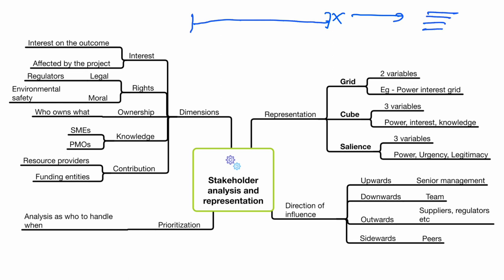Think of it this way: if a highway is being built or closed, whoever will be affected — customers who paid money, people working on it, people displaced — all of those people are your stakeholders. This is the easiest way to identify stakeholders.